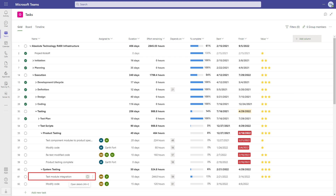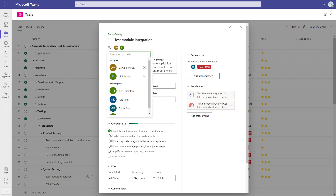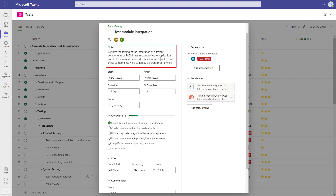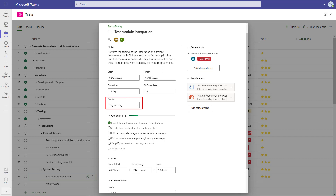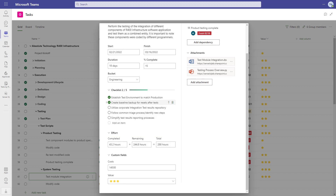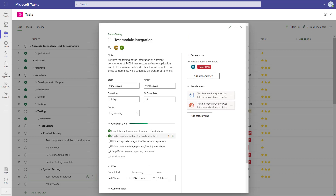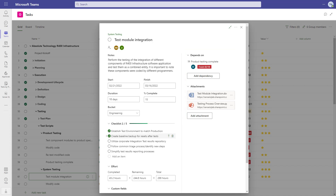If I open up a single task, we can explore more of the functionality. This task is to test the module integration and I can see that it's part of system testing. We can see who is assigned to the task. There's a description to ensure we have a shared understanding of the work. Then start, finish, duration, and percent complete as you would expect. We can organize the work into buckets and add detailed checklist items to help track progress at a more granular level inside the task. Then there's completed effort, remaining effort, and total effort. If you add any local custom fields to your project, those will also show up here. On the right, we have the dependencies and attachments. These attachments can reference the team files in your SharePoint document library. All in all, I think this is a very solid task experience today with more functionality coming in the near future.